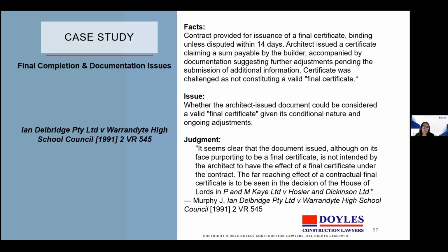In that case, the judge said it seemed clear that the document issued, although on its face it purported to be a final certificate, was not intended by the architect to have the effect of a final certificate under the contract. The far-reaching effects of the contractual final certificate is to be seen in the decision of the House of Lords in P&MK Proprietary Limited. So just remember, conditional final certificates undermine this certainty, and it's important to close it out properly.